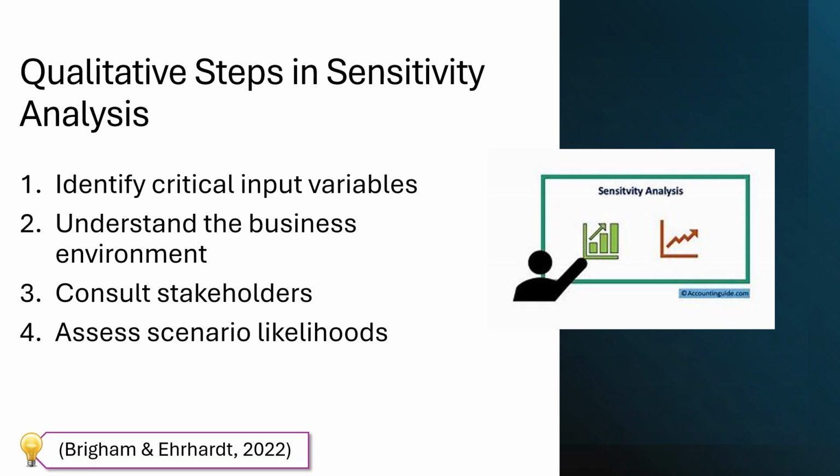The first step is to identify critical input variables such as incremental sales, lost sales, cost of goods sold for incremental sales, advertising expense, new product management salaries and benefits, market research, capital required for new equipment, incremental maintenance expense, and discount factor. Critical input variables with the least confidence are incremental sales and lost sales. Lost sales are purchases that customers would make in the absence of a new product.